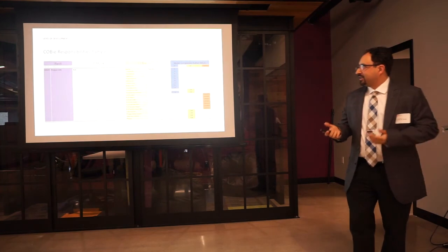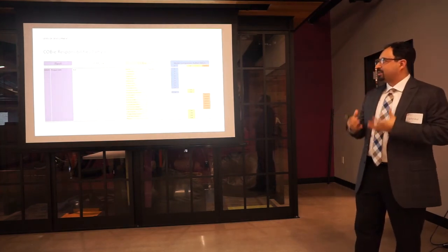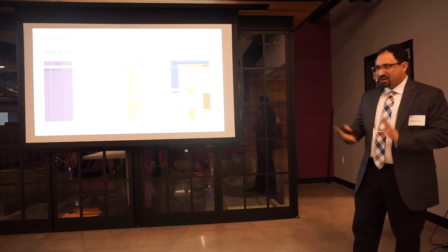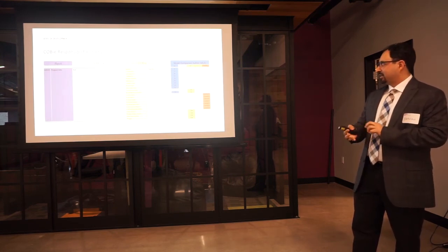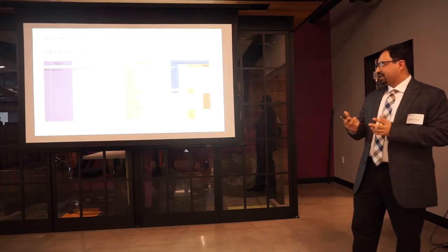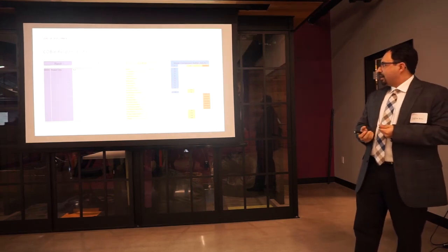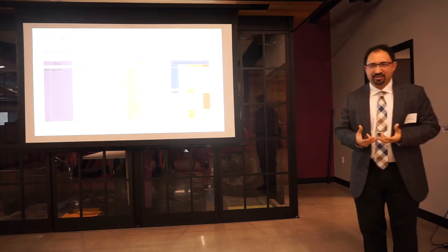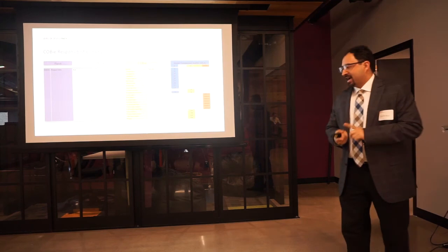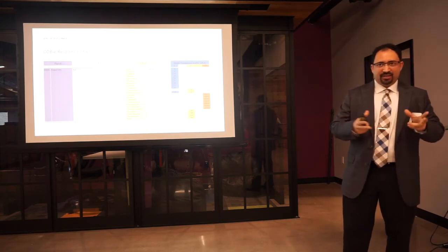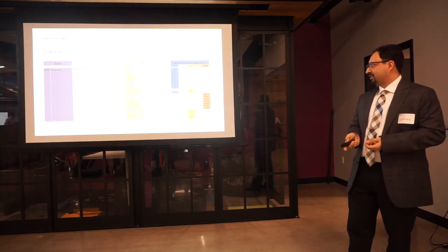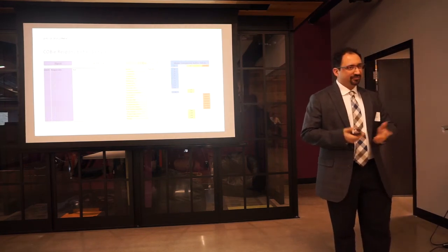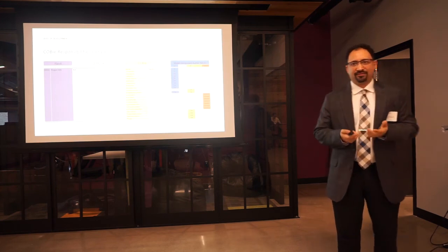So just to give you an idea of some of the responsibilities in COBie, the architect was responsible for the model creation, the name of the item, the created on, created by, which is really a category from Revit specifically. Then you have the construction management team and the ownership who have to insert their own information into the project based on the actual items, the location, the exact parts and pieces, as well as identifiers for the county for that specific unit, so that if something breaks down, they can find it very easily and they can find the information on it.